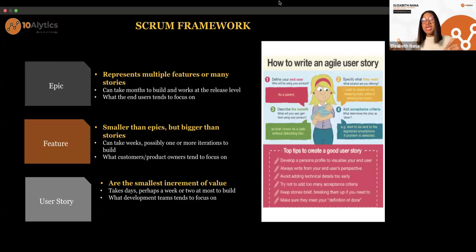So now the quality assurance tester, the QA tester, could probably have someone go into that room, right? And the person goes far away and they connect their phone and you ask that person to move inside the room to see if an alert is sent. Now, if no alert is sent, there is a problem. And then he or she goes back to the developer to say, hey, look, you have not fulfilled this acceptance criteria, so you are not done with this particular feature. Now, those are the 2 reasons we use acceptance criteria.